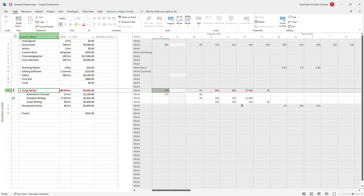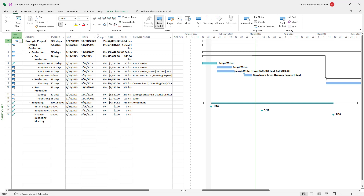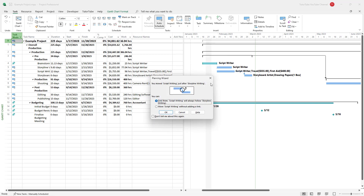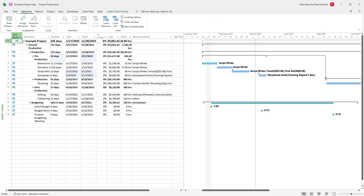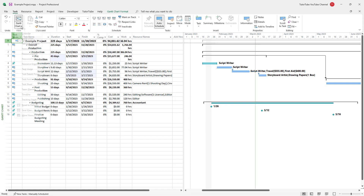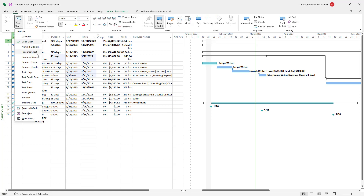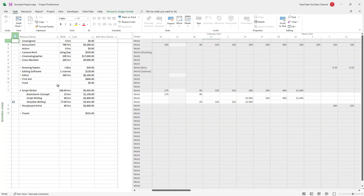You might want to consider changing the task. So you can go to the Gantt chart and make some adjustments. Once you go back to Resource Uses, they are no longer over-allocated.